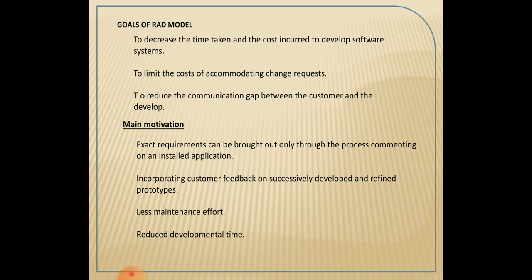That means he sees only the fully developed software, and after working with the fully developed software, the customer knows about his actual requirements. So in many cases there may be many change requests generated by the customer. The changes are incorporated through subsequent maintenance effort. So heavy maintenance effort is needed in those cases to accommodate the customer's change requests.